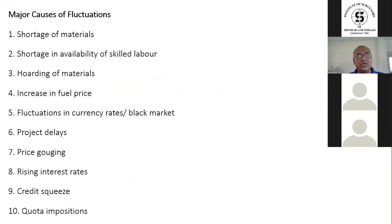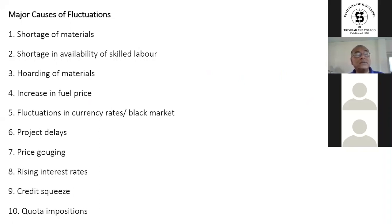The major causes of fluctuations include: shortages of materials, shortage in availability of skilled labor, hoarding of materials, increase in fuel price, fluctuations in currency rates or the black market, project delays, price gouging, rising interest rates, credit squeeze, and quota impositions.